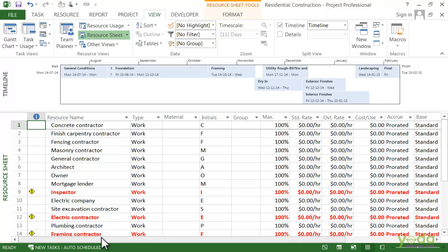The third type is a cost resource, and by process of elimination, if you don't assign by time and you don't assign by quantity, then you are going to use the cost resource. So things like lodging, airfare, permits, fees, tuition, that sort of thing.